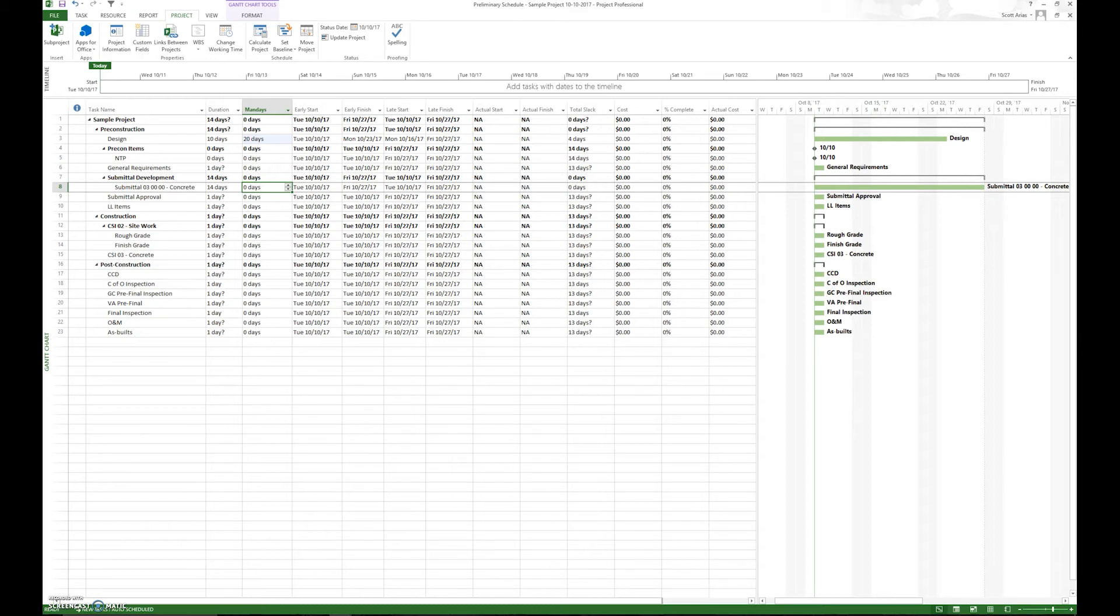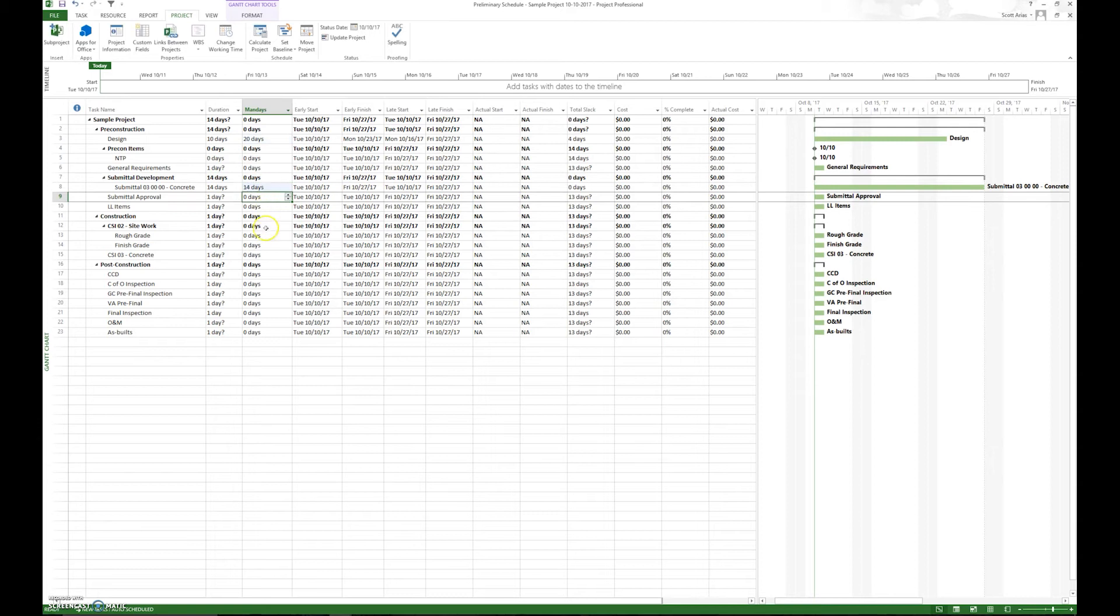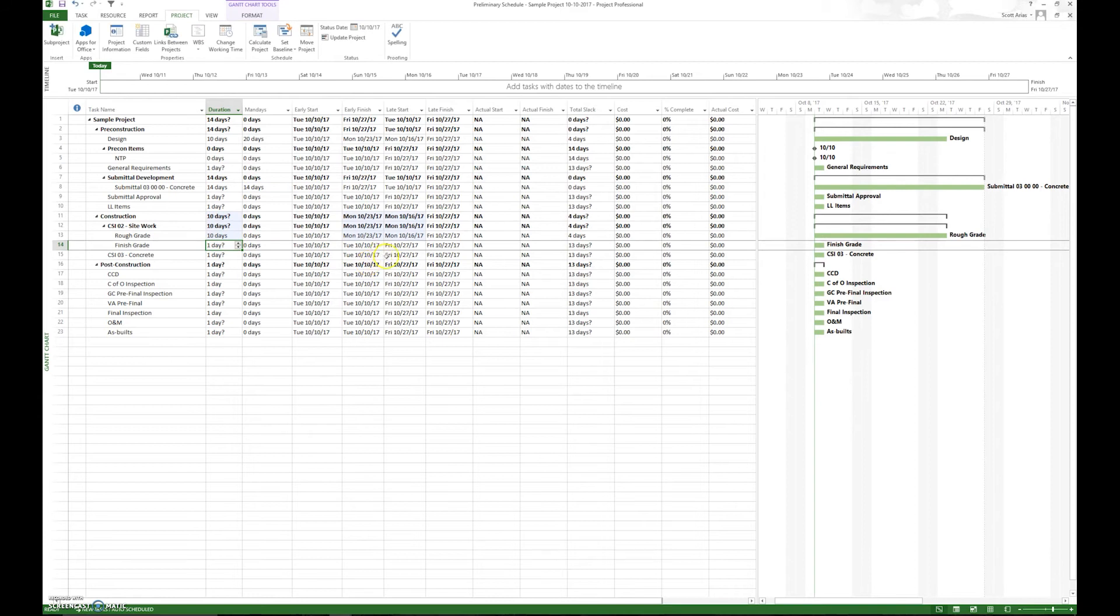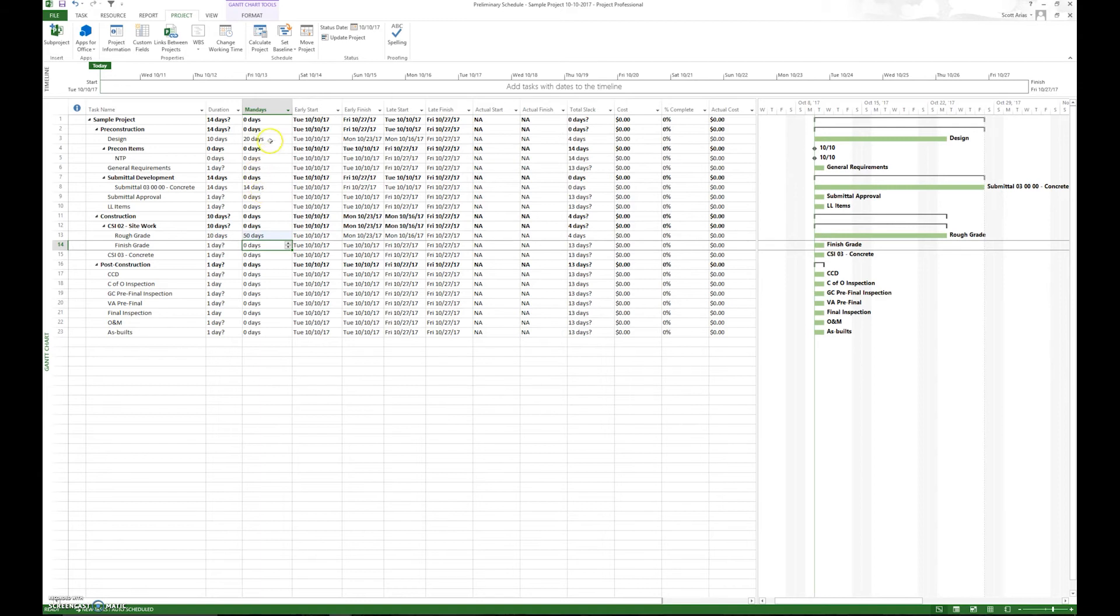So we want to have the metrics of duration and man days identified within our schedule. So muddle foot concrete, say we have 14 and say we only have one person working on it, it'd be 14 days. But something like rough grade could be 10 days, but we have five people working on it. So it'd be 50 man days. So very important to have both this information.